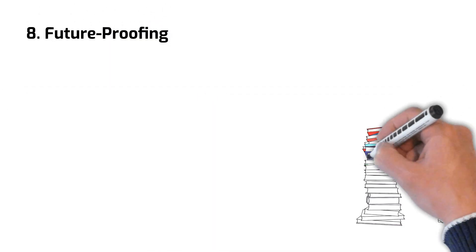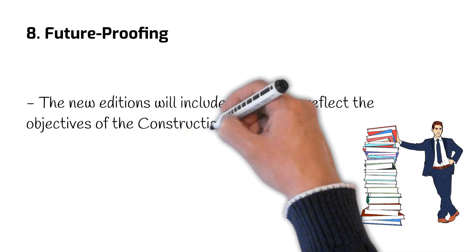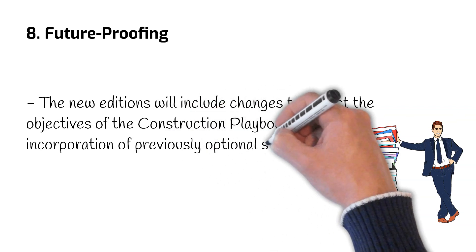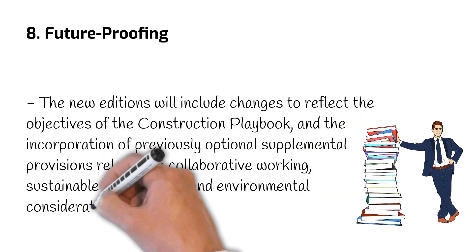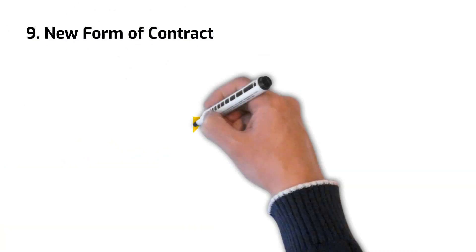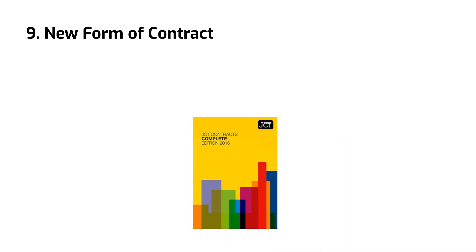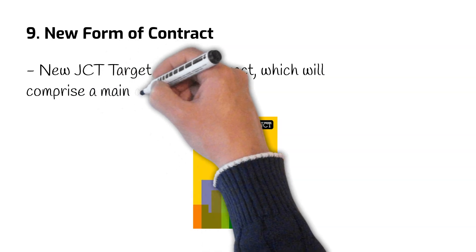Number 8: Future-proofing. The new editions will include changes to reflect the objectives of the Construction Playbook, and the incorporation of previously optional supplemental provisions relating to collaborative working, sustainable development, and environmental considerations into the main contract. Finally, number 9: New Form of Contract. It has been announced that JCT 2024 will introduce a new contract family, the JCT Target Cost Contract, which will comprise a main contract, subcontract, and a guide.